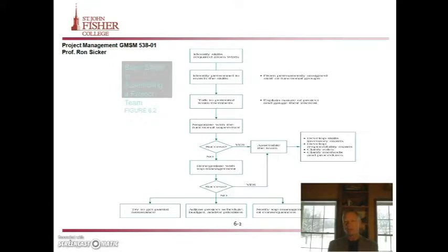The negotiation with the supervisor happens both at the champion level, as we talked about, as well as at the project manager level. Sometimes there's a joint meeting. Sometimes it's just the champion doing it, paving the way for it. Sometimes that has to be negotiated up, and sometimes we have to go to a higher order, maybe a VP or something like that, in order to secure some resources.